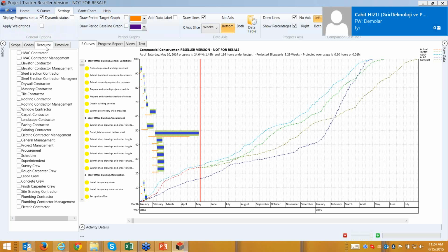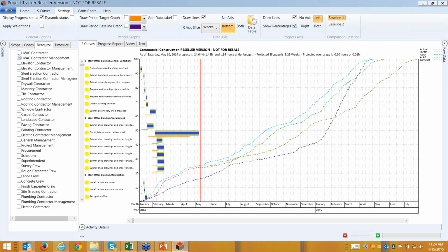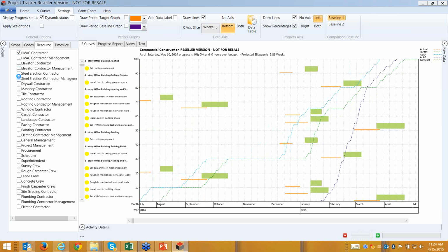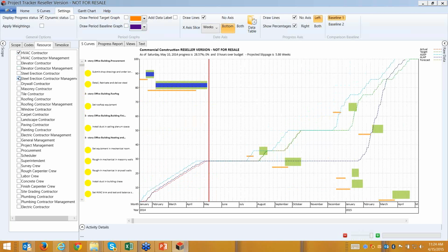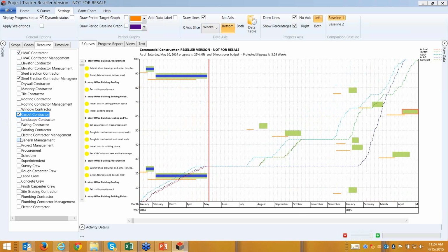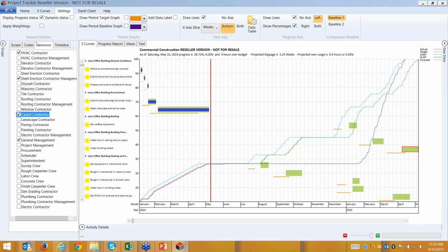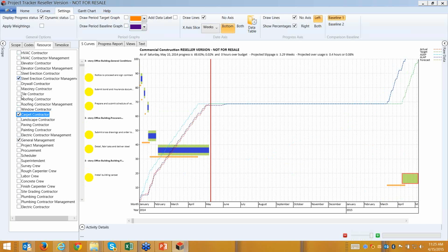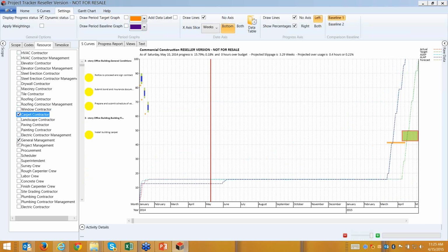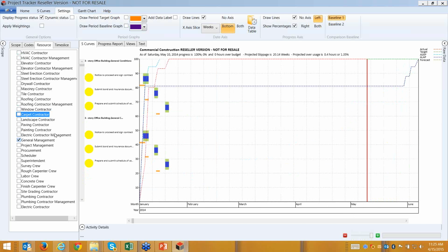If we have a resource assignment in Primavera or Microsoft Project, we can also select the resource assignment. This way, we can get the specific resource S-curve. For here and for here, you can see that it will give the combination of those resources as a unit. It's very useful and easy with the resource S-curve.